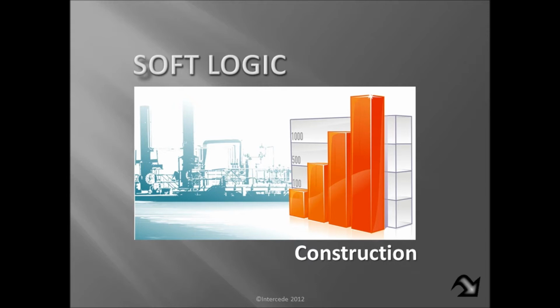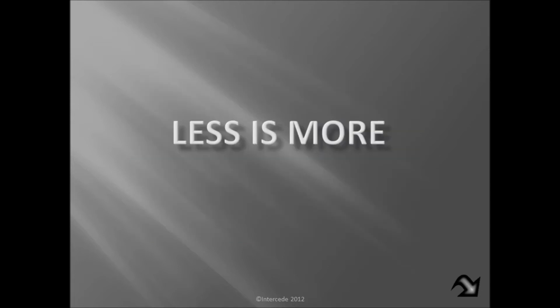But again, as you might have noticed, as we're moving through these three phases, the elements that we have to control are becoming more voluminous, more complex. And so it's even more important that we adhere to the watchwords for soft logic, in which less is more. We want to take as much detail off the schedule so that there's greater visibility to those elements that really do require a rigid installation sequence and monitoring, because that's more likely where your critical path is going to be.